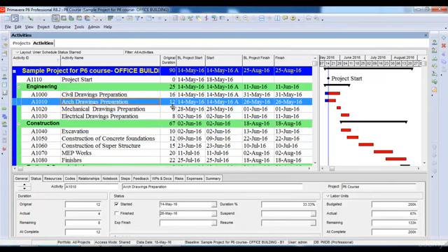Similarly, to this activity it has assigned 33.33% of progress because 4 days out of 12 days have elapsed. But as I have told you, this is not a proper way to update the project if your project is not going according to the baseline dates. Also, you can see the change in the Gantt chart. It gives the blue color to the part of the activity that has been completed.